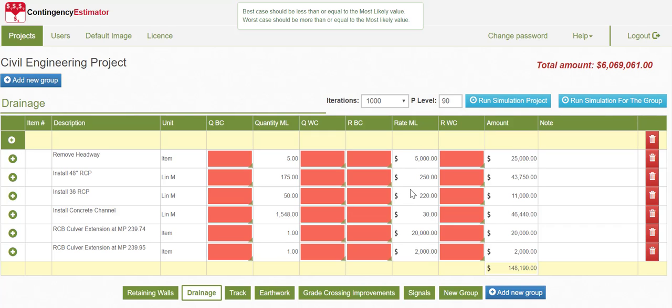A small workshop needs to be held between the estimator, project manager, normally designer, and quite often customer. The workshop undertakes 2 items. It discusses each item and thereby looks at the variability of quantities and rates, and also the discussion distills where there might be errors in scope or scope elements that are missing. So the workshop discussion is very important.